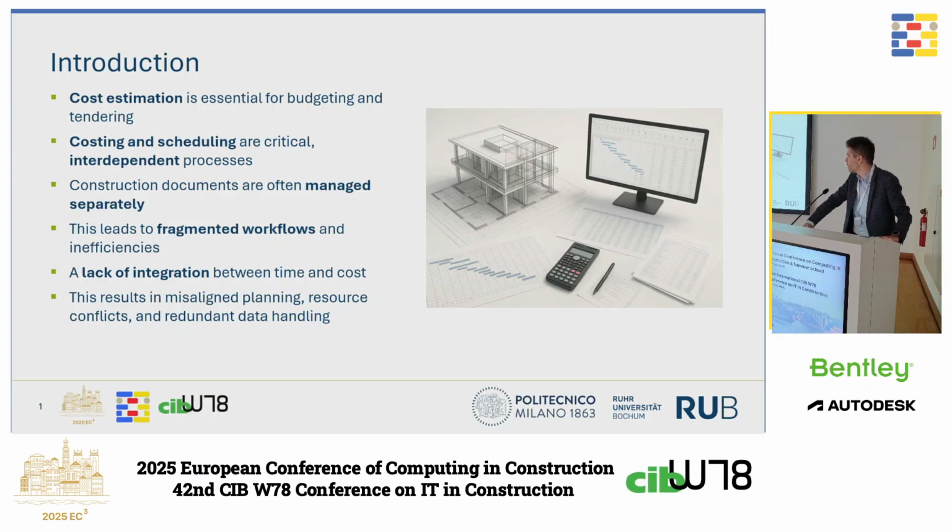We know that we work with 4D models, 5D models, so we have this integration, but with the technologies and software available today, the connection between our 3D models and the elements related to cost and time is still fragmented, because usually the connection is based on codes. Our digital environment cannot recognize problems or issues in the connection between the elements, and cannot interconnect the different domains that we have.